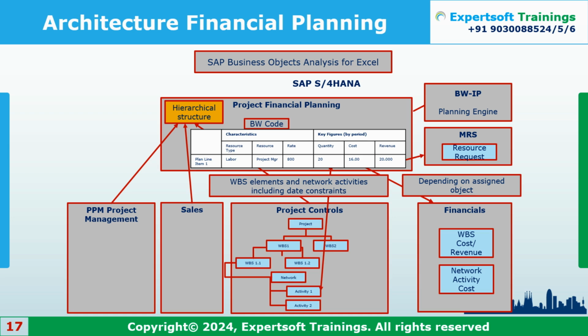If people directly go and do the budget planning there, there will be implications for my WIP calculations, because if I am going to run the result analysis, the cost planning is very important. Absolutely correct. So the discipline has to be there. If you want the WIP and all those kinds of result analysis, then you have to update the cost planning parallel to budgeting, right?